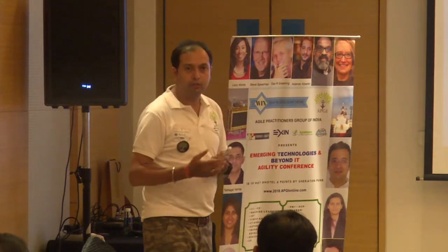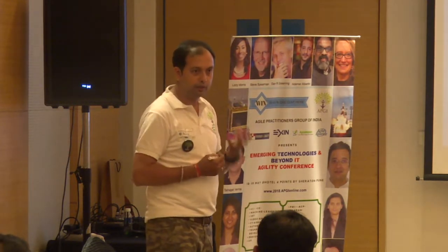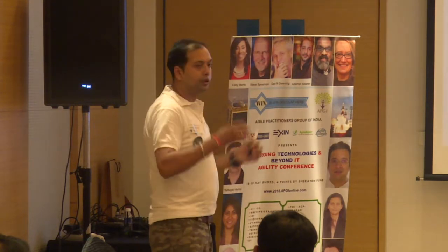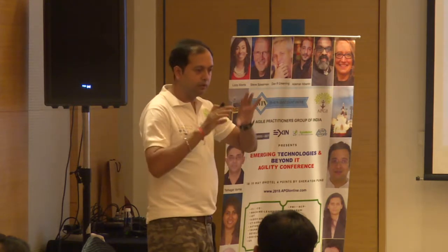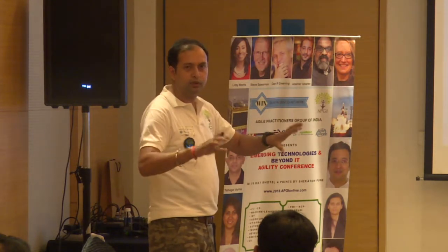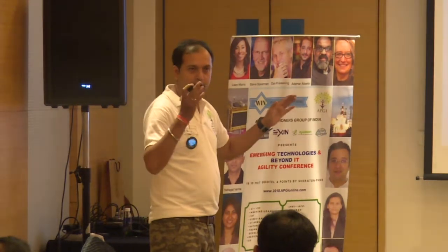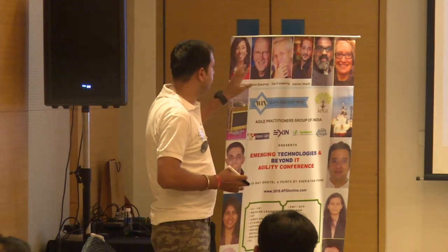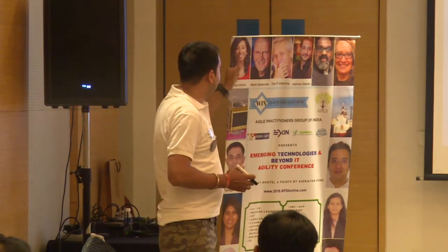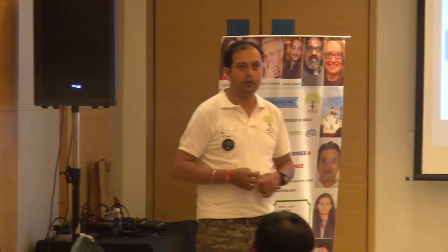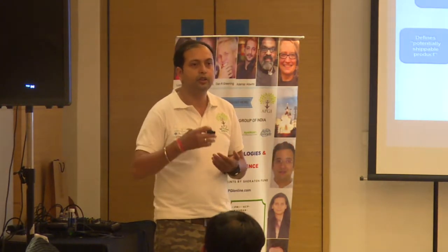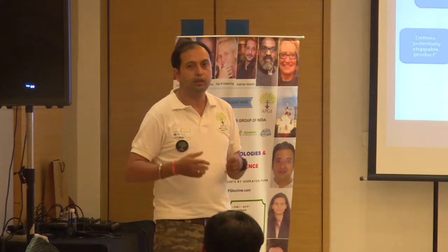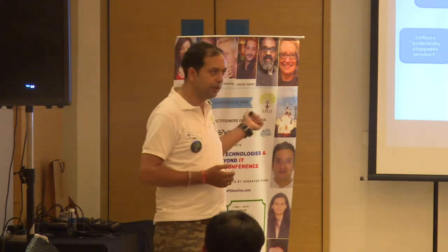When the work should get completed, the ownership should be clearly defined for the definition of done. It will help the team identify their capacity when they go into functionality and non-functionality, everything they are going to deal with in every story. It will define the potentially shippable product. We refer to all the principles and always see that whatever we are producing in one sprint should definitely be shippable. But how can it be determined? That can be determined using the DoD.